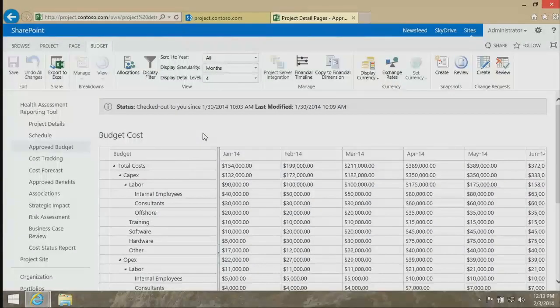My benefits timeline is going to start at some point within the project or program's life, or it's going to start at the end. So you literally manage the timeline for these things independent of the schedule. And so, yes, one of our previous demonstration environments actually had the concept of one-time costs for a project versus recurring costs, which again would impact that payback timeline.